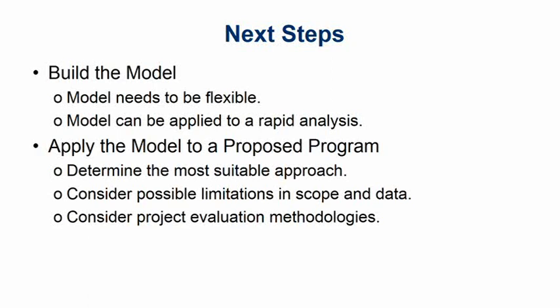Whereas a sequential approach requires a ranking of projects, and you evaluate each one at a time. So you start with the first one, and then you just go with the second one, which will then assume the first one's going to be built, and you go with the third one, which would assume the second one's going to be built, and you continue on until your budget runs out. So you had to decide which of those approaches was going to be more appropriate to apply to this program.